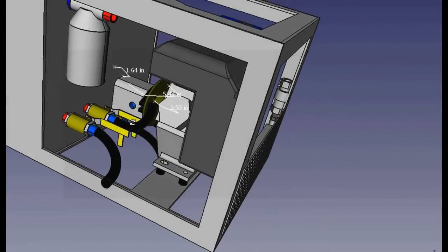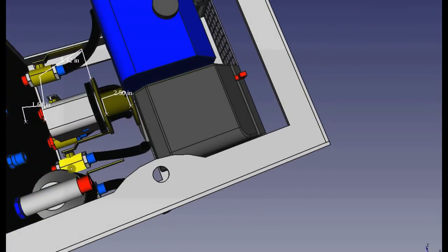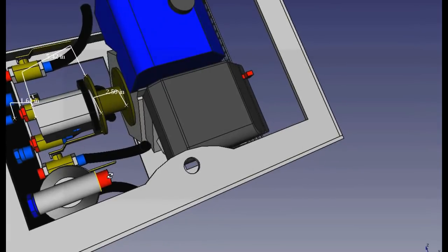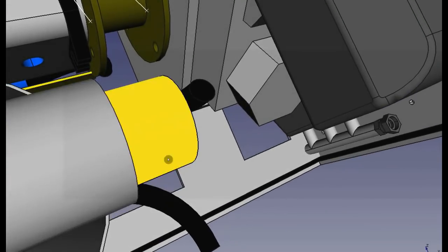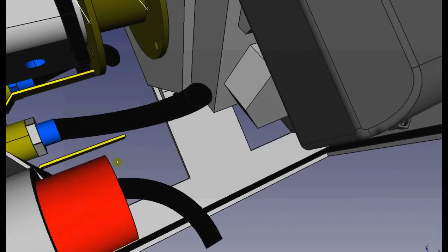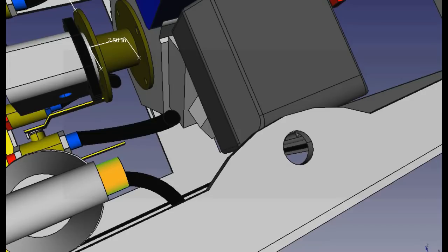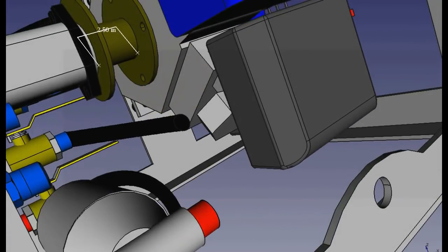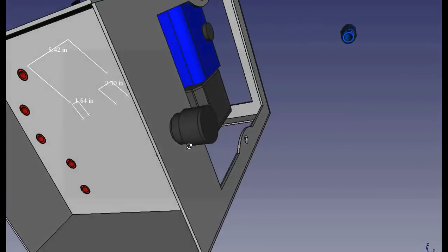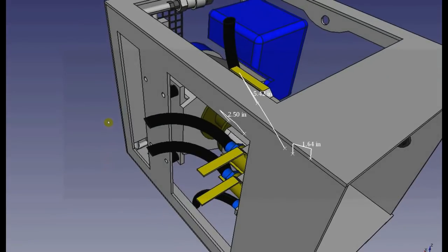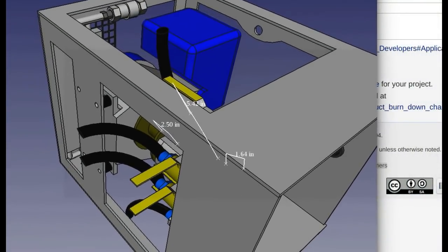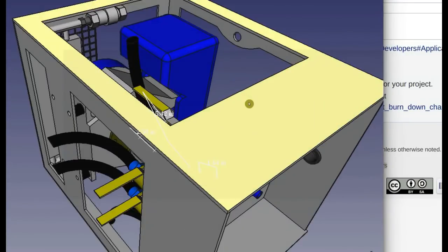It's got enough parts in there that we know, for example, exactly what that fitting is on the filter element. It can be a placeholder, but in a tree view that should be labeled properly. We should be able to take the tree view and generate a whole BOM, and that would be a good exercise for the next step, generating BOMs via the tree view. I would say this CAD file is absolutely complete when we can simply export the tree view as a BOM parts list. I think there's some limited BOM functionality like that, but we should explore that later.